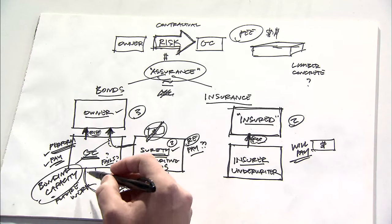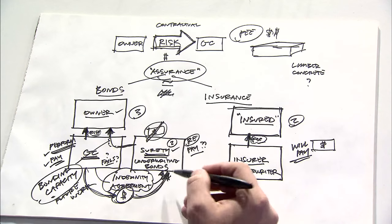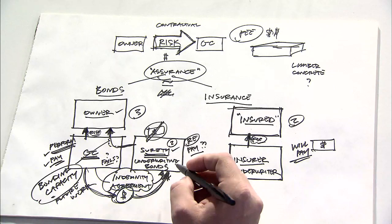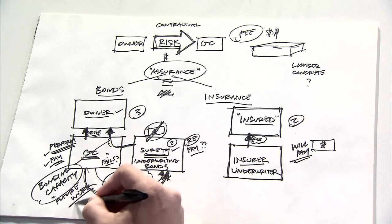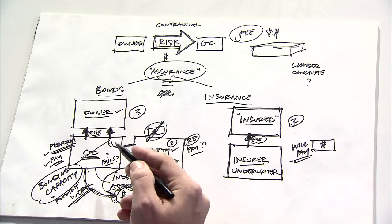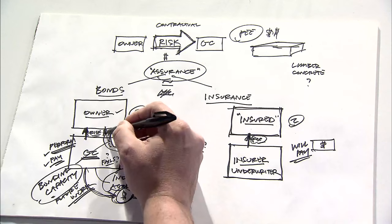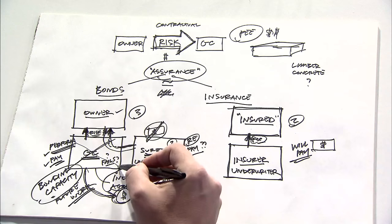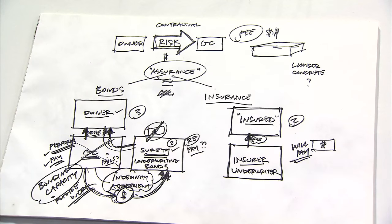And just because the indemnity agreement says that the contractor would have to pay them back, the contractor needs future work, so that by the time a project gets to be such that the surety actually has to make payment, then the contractor is in such poor shape that there's nothing liquid left for the surety to recoup through the indemnity agreement, which is the surety's greatest risk.